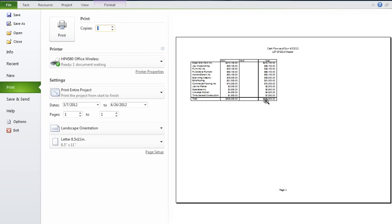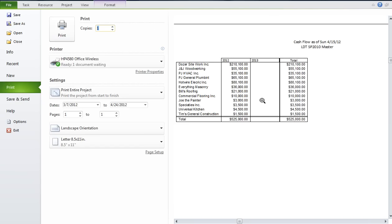There we go — a more interesting run this time, and all the work will be done in 2012. You can see Dozer Siteworks is contracted to do over $210,000 worth of work, J&J Woodworking right down the line in order from greatest to least, with a total for the project of $525,000. So those are a couple of different ways of using Cost instead of time and materials — a fixed cost contract — and also how you can look at your costs by resource rather than individually.